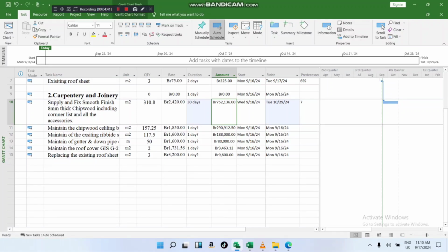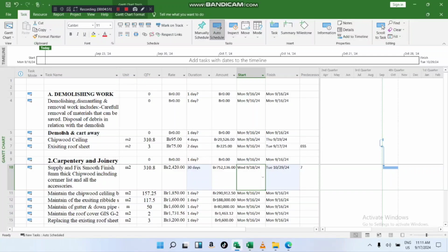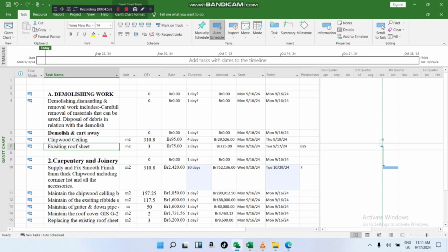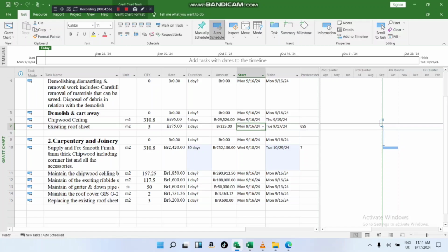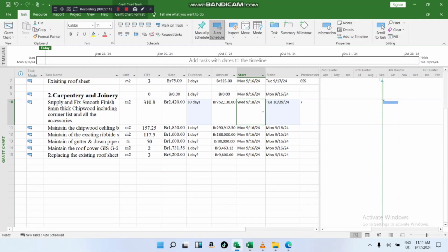If you want the starting, it will tell you, because it's finish to start, so it will start after this, today, Wednesday. Okay, it is like this. And then it will finish on Tuesday.